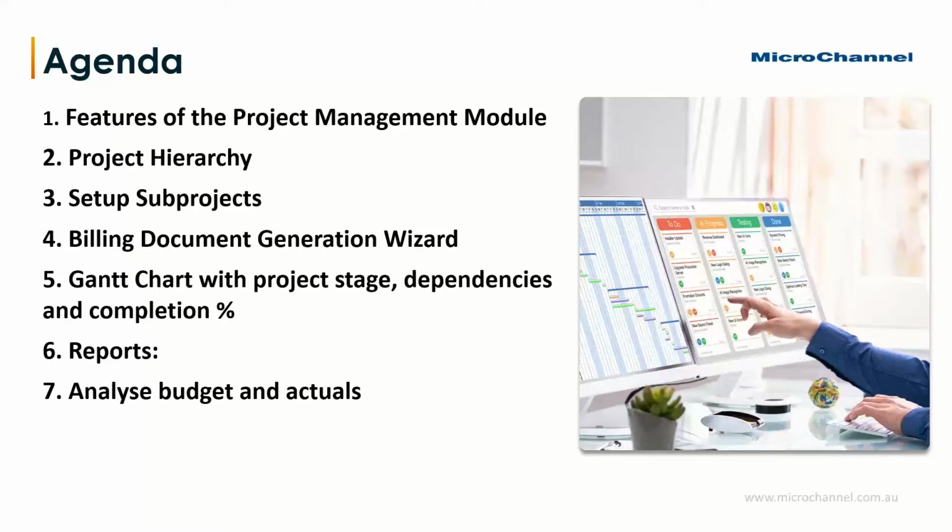A project setup can either be an internal project, which means there's no customer or supplier, or it can be an external project where you have either selected a customer or a supplier. The project master data is the central location for all things relating to a project. This includes the stages and the related schedules, the sales and purchasing documents, the inventory transactions, the production transactions. You can also track issues, activities, the budgets and actuals reporting, and more importantly, the actual project is also linked to a financial project in the accounting side.